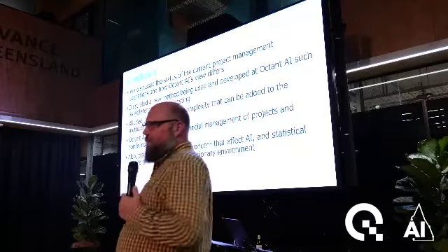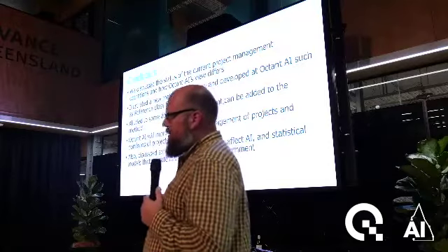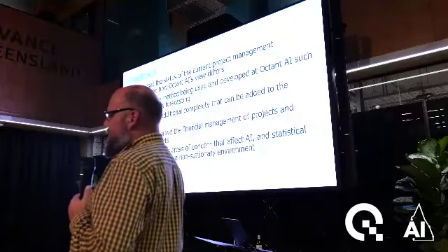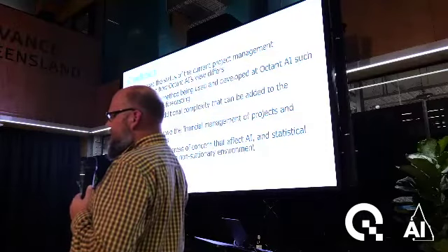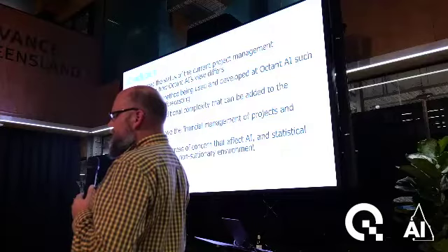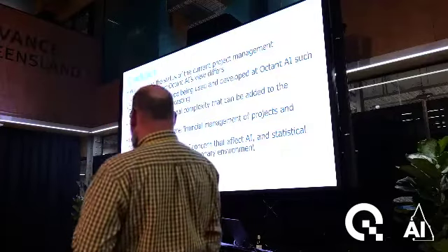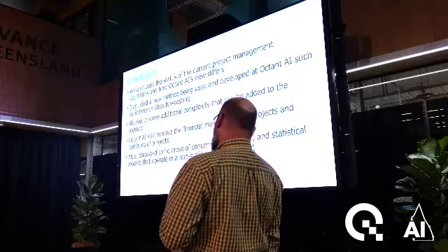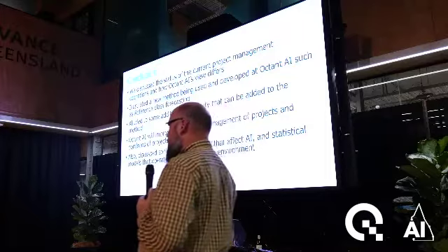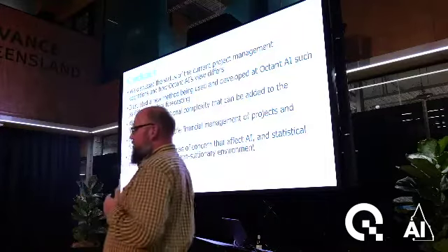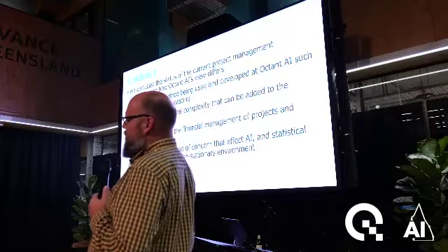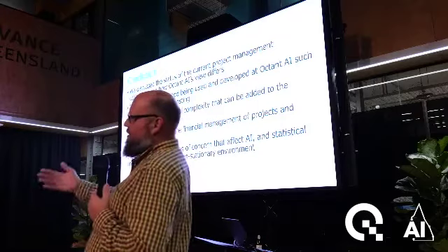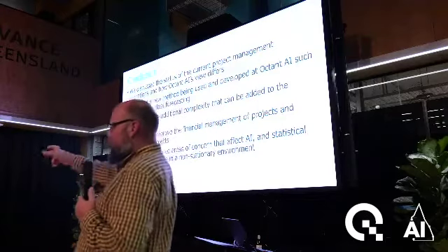Any other questions? Given the projects you're doing are capital intensive, you've touched on before with your previous work, like looking at oil prices through Platts, have you looked much at the cost of inputs like steel, and how they correlate or may cause it? I haven't done those models here. I've done them in other places, but I've mentioned to people that that's even worse why their Monte Carlo simulations aren't working, because they've got static prices, and there might be varying schedule lengths going through.